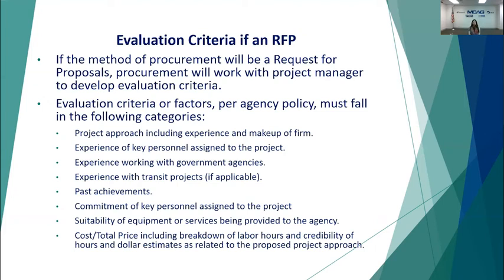The evaluation criteria factors based on our policy must fall in the following categories: project approach and the experience of the company, experience of the persons that are assigned to the project, experience working with government agencies, experience working on transit projects if applicable, past achievements, commitment of the persons that will be assigned to the project, and the suitability of the equipment and the services being provided to us.